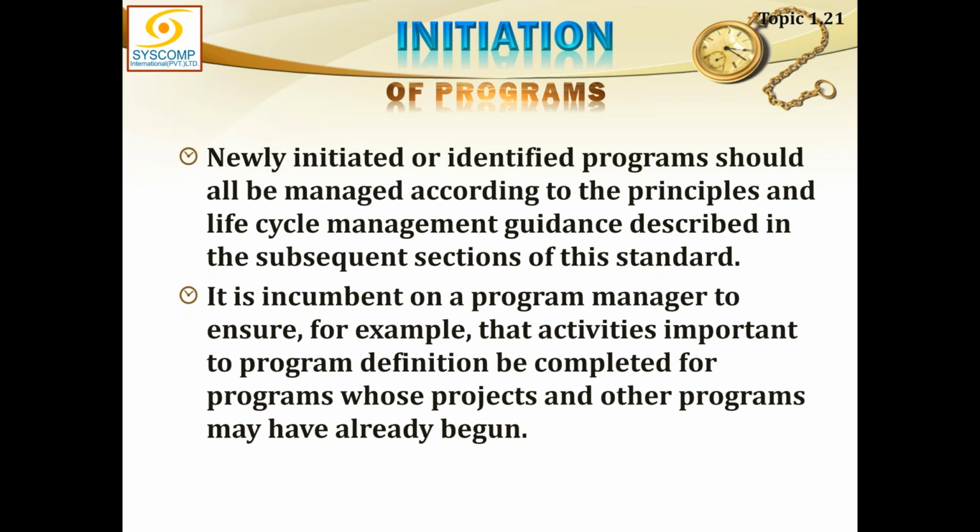But a program is such a huge thing that we cannot have a customized kind of life cycle there. We need to have a standard life cycle, like program initiation, program delivery, program closure. So these kinds of things have to be defined, and you have to pass through one gate towards the other phase. So that defines the program life cycle.